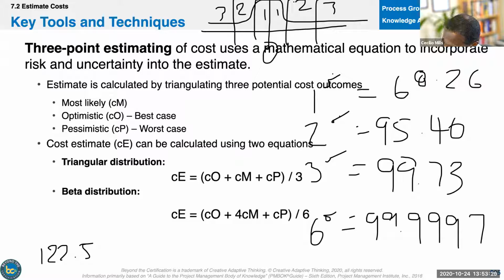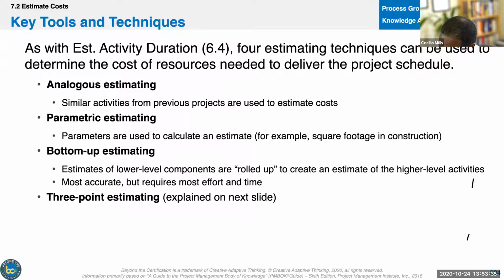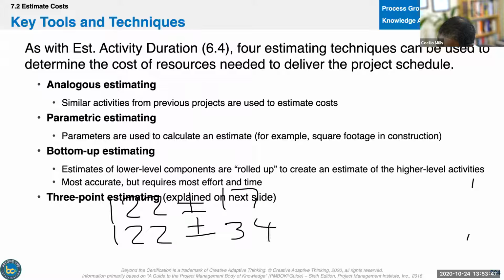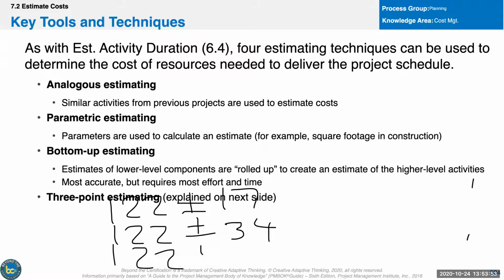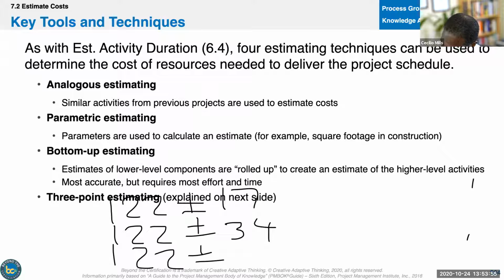Okay. So now what we do is we say, and I need a little bit more white space, so I'm going to jump back here, 122 plus minus 17, 122 plus minus 34. That would be 2 standard deviations. Follow me so far? Yep. And then 122 plus minus 17 and 34 would be 51.